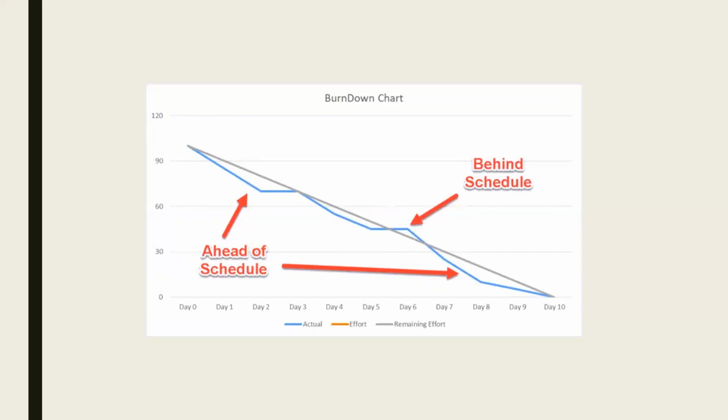You can't stress the people for delivering every time like they did in the previous sprint. So it is not a good practice to assess the team members' performance on this particular chart. These charts are just to showcase how we are progressing towards a goal, but not the individual's performance or the team's performance.